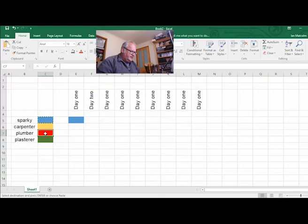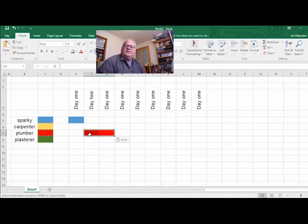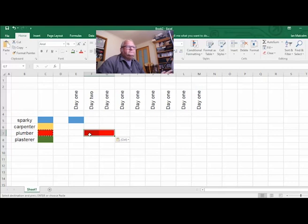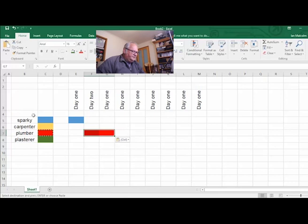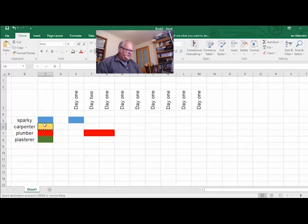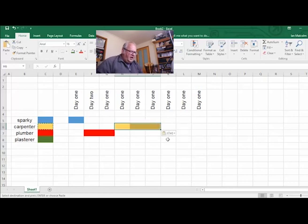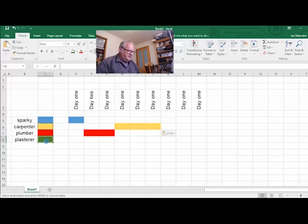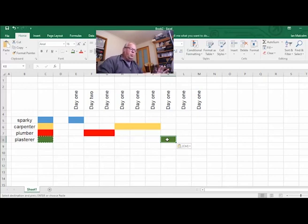The plumber's coming Day Two and will come for two days — Ctrl+C, Ctrl+V — to disconnect everything and also start doing a bit of roughing in depending on the job. Then the carpenter is coming for three days — Ctrl+C, Ctrl+V. After that, the plasterer comes in — Ctrl+C, Ctrl+V. Now we can start to see what order the trades are coming and what days they're on.